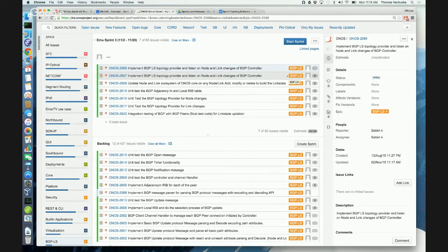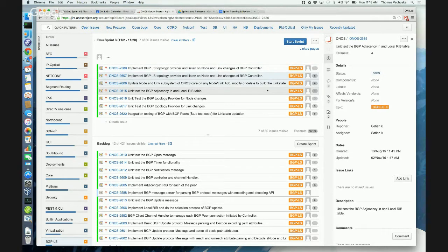Couple of things here. Just a couple of observations. These three stories, as a matter of fact, are sort of non-compliant. These estimates should fall into the Fibonacci series. I think now they were slowly picking up the UTs. The one here is trying to cover the previous sprint. I think it's somewhere in the previous sprint. So let me find out.